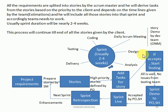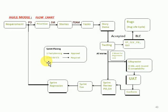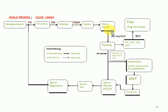This is the entire Agile process. Looking at a more detailed diagram: requirements are handled by the product owner who prioritizes them; the scrum master creates stories; the team creates tasks. Development people give the story demo; the testing team performs testing after accepting the story demo.